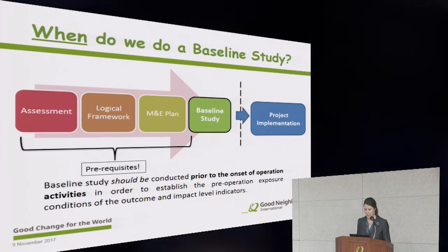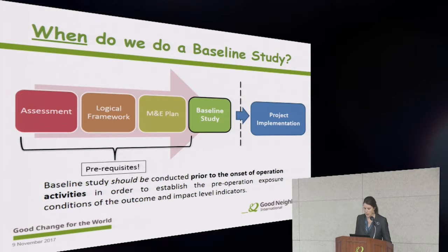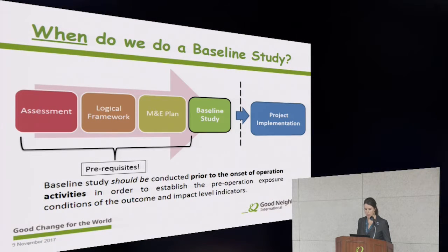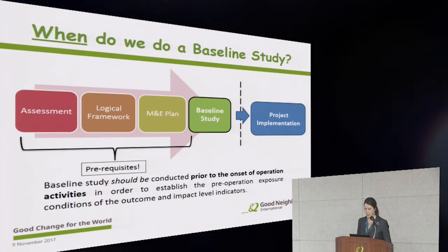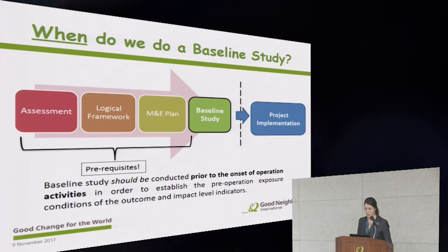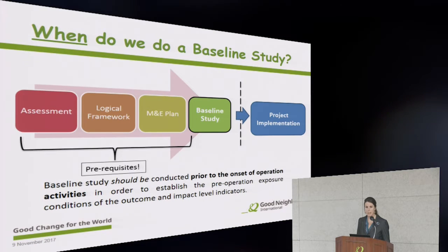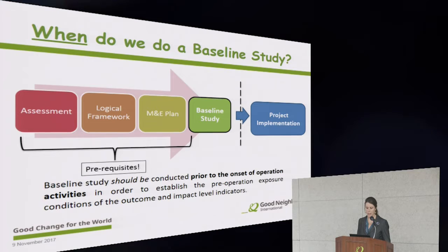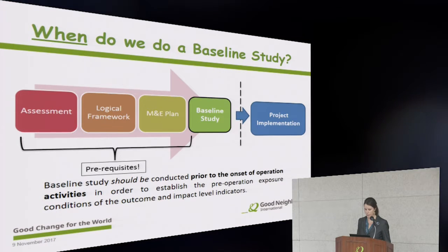ideally. So delays in conducting the baseline study, especially when operations activities have already influenced the outcome and impact of performance indicators, are likely to lead to an underestimation of the overall project impact. So we're missing some impact that we could be using to gain support. So we really want to conduct the baseline as soon as possible.